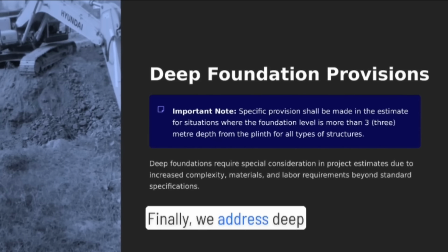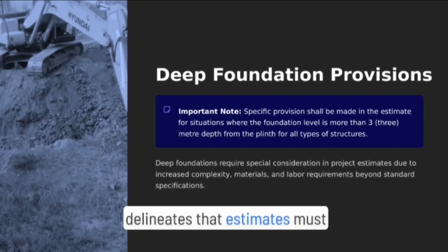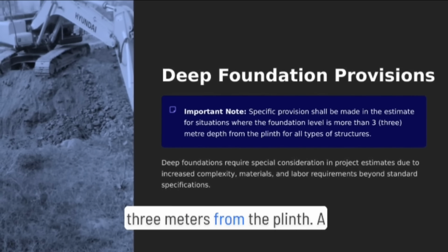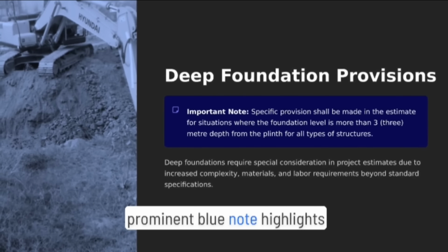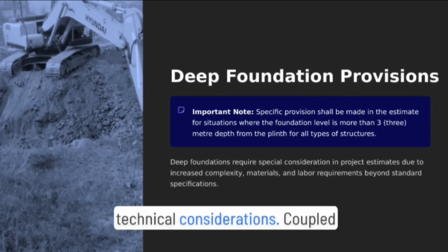Finally, we address deep foundation provisions. The slide delineates that estimates must account for foundations exceeding 3 meters from the plinth. A prominent blue note highlights additional material, labor, and technical considerations.